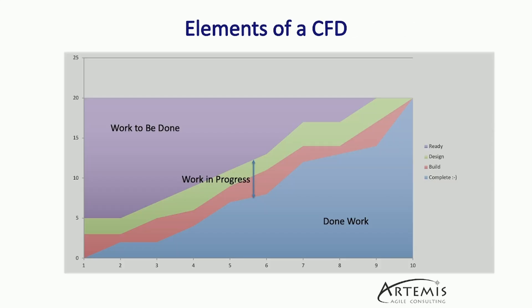The basic elements of your CFD are your different work steps. In this case, we have Ready, Design, and Build as two separate work steps, and then Complete, which is all of the items that have been accepted by our product owner. You can tell how much work is to be done simply based off of the size of the purple area here. You can tell the amount of work that's in progress by seeing how many are in your in-progress states, and you can see that you have a good burnup or not based on where your work done chart is showing.